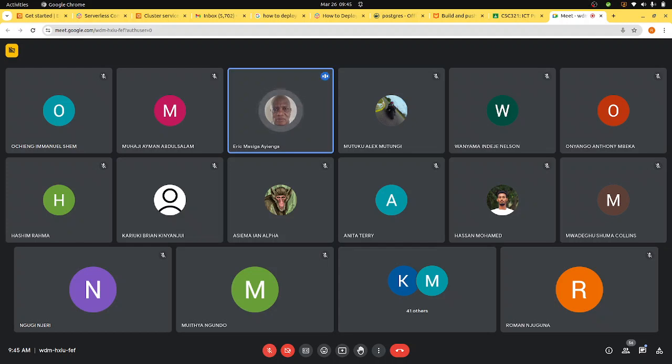And the university, like the procurement department, has a template which they use for vetting, where they look at the history, they look at your financial statements, they look at your record, they look at your tax status, and so on. I've gone to one of these meetings. This is a template that specifies those things. So you award marks, and then the one with the highest mark is awarded the tender.